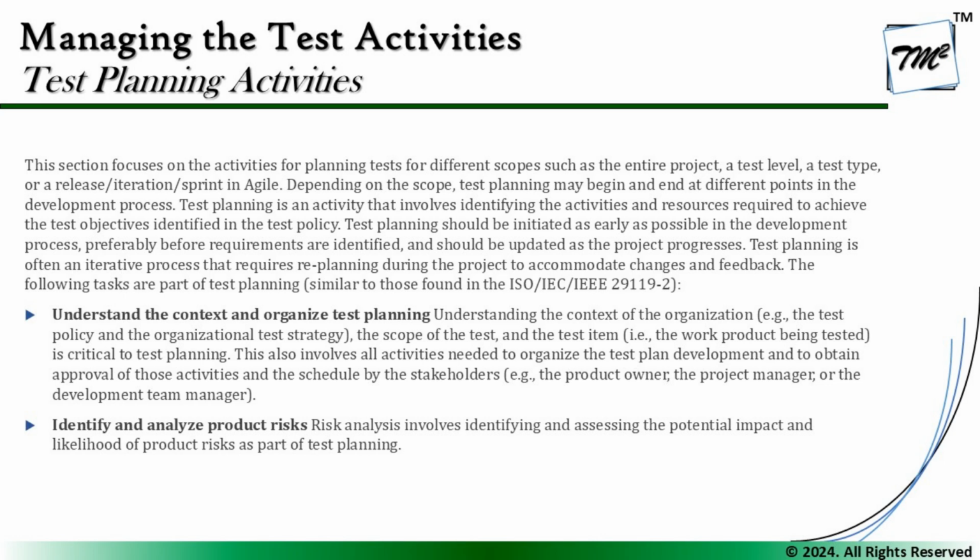But further, if we try to deep dive and recall that when it comes to the traditional model, we told you that planning happens once for all in the beginning, but of course, there's always a scope of replanning as and when a deviation is observed, or even if a control action is being taken, or there's a change in the scope of the project or activities, then replanning can certainly take place. And replanning refers to revisions in the plan. However, we don't strongly recommend that you revise your plan quite often, but as and when required, we should not ignore it as well.